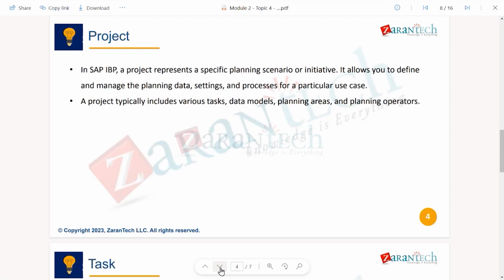Basically, the project team first maps the as-is process. When I say as-is process, it is how the activities are currently handled by the organization. At a detail level, the project execution and management team will directly talk to the end users who are actually doing the day-to-day operations of various processes, and they will make a list of all these small tasks currently performed by various users, and they will create a process document called standard operating procedures.